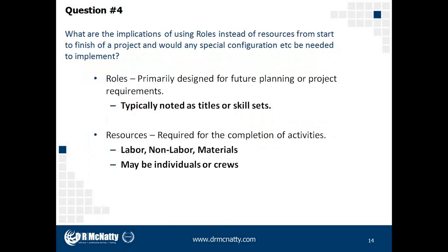The first thing to understand are the fundamental differences inside of P6 between roles and resources. Roles are intended for future planning of project requirements. The intent of the roles is for projects that we are maybe planning in a next fiscal year, where we want to begin to do some high-level capacity analysis. So we can set up roles in our P6 environment, and the roles are typically going to be titles or skill sets. There will be project manager, superintendent, cost engineer, and these can be assigned to activities in future schedules, and then eventually, as the project gets closer, those roles are replaced or updated with an actual resource.